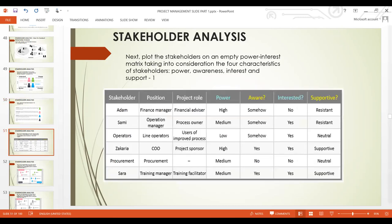Next, plot the stakeholders on an empty power-interest matrix, taking into consideration the four characteristics: power, awareness, interest, and support. List the stakeholders and their positions. For example, Adam is a Finance Manager whose project role is Financial Advisor. His power is high, awareness is somehow, interested is no, and his support status is resistant. This is a very difficult stakeholder. Sammy is an Operations Manager and Process Owner with medium power, somehow aware, interested yes, but supportive: no — also very resistant. Sarah is a Training Manager and Training Facilitator with medium power, aware yes, interested yes, supportive yes.